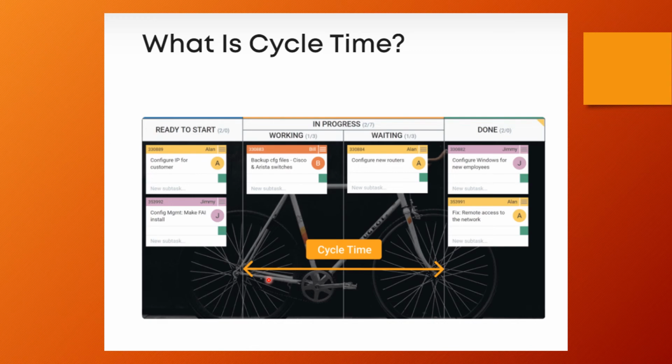From an internal engineering perspective, cycle time will be very useful. From a customer perspective, lead time will be useful, because the customer is worried only about the lead time. The customer is not worried about your cycle time, right? The moment he places the request, that's the day it starts, in which he will say that it took 30 days to deliver a car, to receive a car. The moment he booked the car, the lead time tick starts.